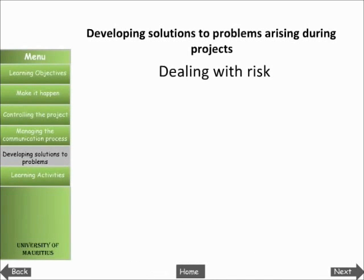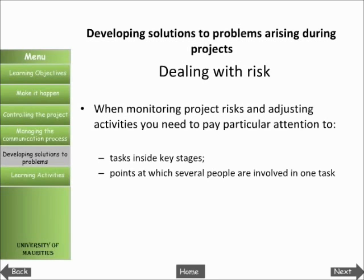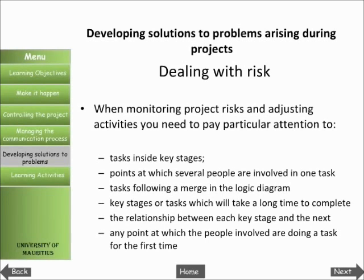Projects are high risk activities, and it is in the early stages that uncertainty is greatest. When monitoring project risks and adjusting activities, you need to pay particular attention to: tasks inside key stages; points at which several people are involved in one task; tasks following merge points in the logic diagram; and key stages or tasks which will take a long time to complete, tasks involving new or unfamiliar technology.